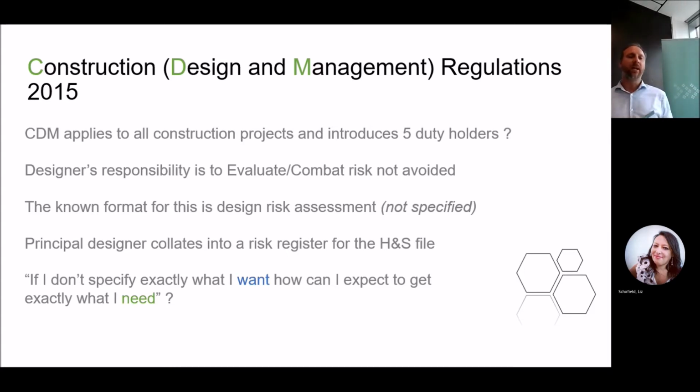So designers' responsibility is to evaluate and combat the risks that they cannot avoid in their designs. The known format to do this is called a design risk assessment, although the design risk assessment is not specified in any regulation. So the principal designer has to pull together this unspecified information and has devised a way of doing this, which is called a risk register. The risk register will ultimately feed into the health and safety file at the end of the project.